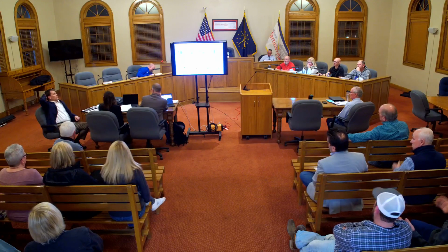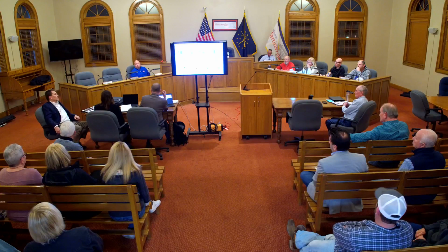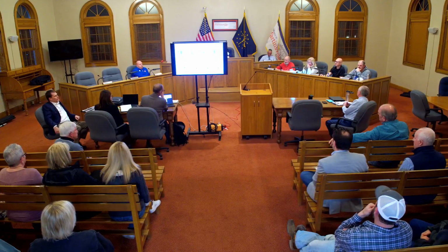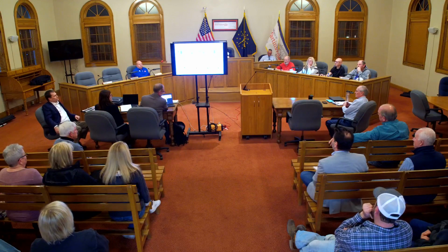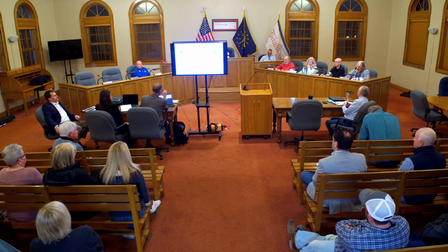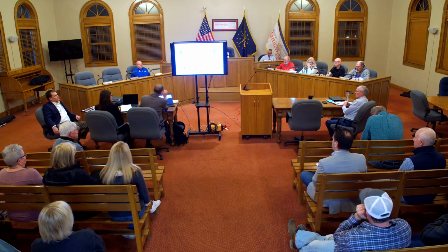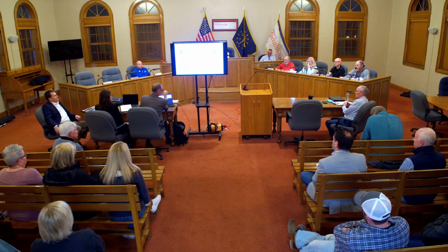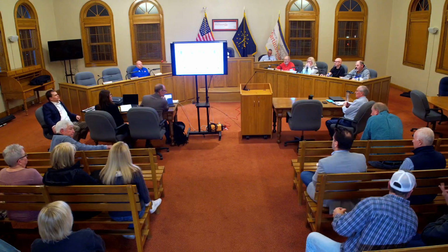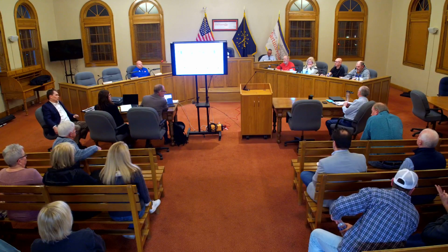We usually see 10% on renovation and 4 or 5% on the new building. Is that pretty standard that you've seen? That's what, in my previous life, we worked to, those kinds of percentages. This is a relatively small building with the potential for some pretty significant issues, so it starts to crank that up. Yeah, there's less room to maneuver. Thank you.